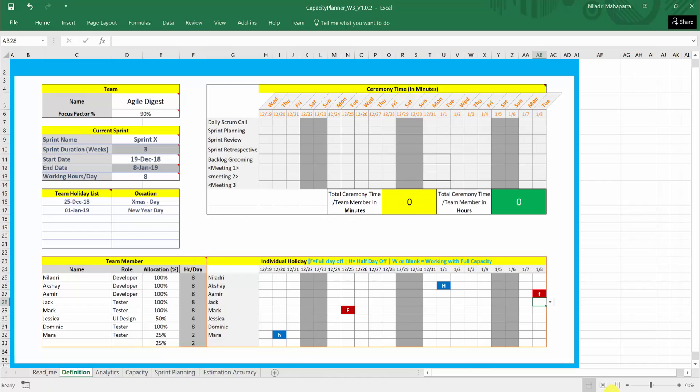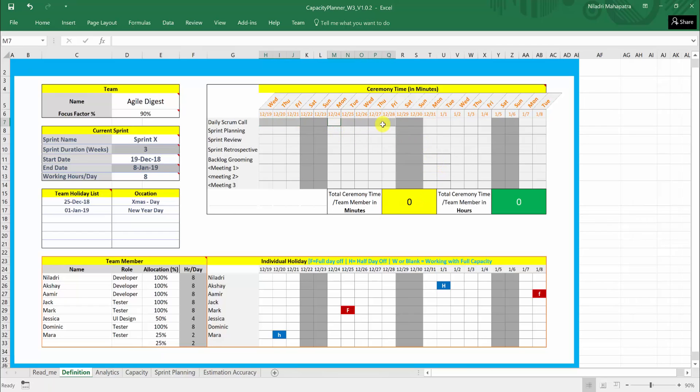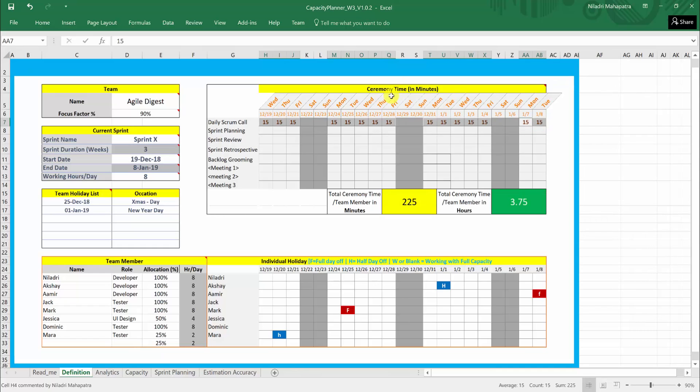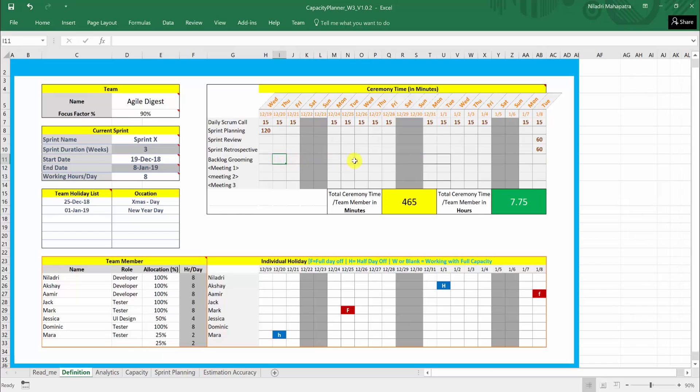Now there are some times you spend on attending your ceremonies like daily scrum calls, sprint planning, sprint reviews, sprint retrospective. So how will be doing it? So once you have set up your start date and end date, you already saw what is the weekend is coming. So you can actually simply select all the dates that you will be putting time for. So for an example, let me say I will be spending 15 minutes every day for daily scrum call. So here all entries will be on 15. Now sprint planning I usually do at the first day of the sprint. So 120 minutes here. Sprint review last day of the sprint that is here. Let us assume 60 minutes and 60 minutes and grooming I have actually scheduled every Tuesday and Thursday. So all Tuesday and Thursday, I will be doing grooming to mature up my backlog and accept the last date if it is a Tuesday and I will be saying how much time I spend 60 minutes.